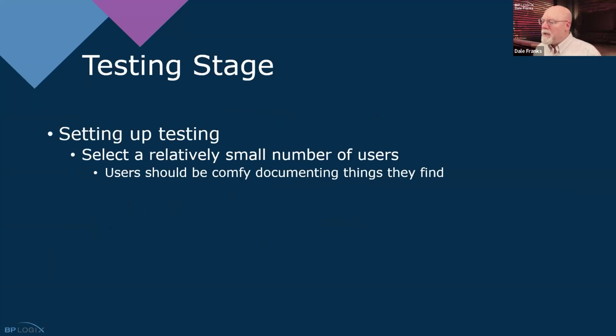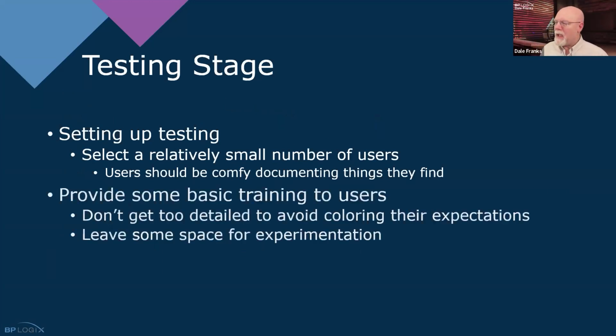You've got a couple of different ways of setting up testing. You should use a relatively small number of users. They should be comfortable in being able to document what they find. Give them some training, but don't give them detailed training about how the application works. We don't want to color their expectations. Let them get into it. Let them figure it out themselves, with some space to experiment with things to see what they think will work better for them.